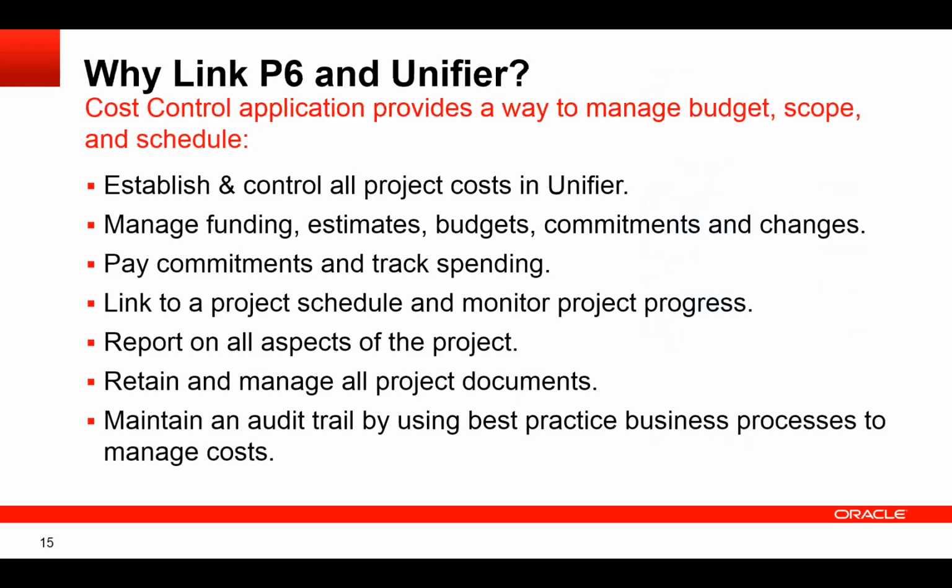Why do we want to do it? Well, P6 is not a cost tool. And over the years, many people have tried to use it as a cost tool, but it's really designed as a scheduling tool, and it has to be kind of force-fit into managing costs. With Unifier, we have something that is designed from the beginning to manage costs. So I can establish and control all of my project costs. I can manage funding, various estimates, budgets, commitments, changes, my payments, track my spending.